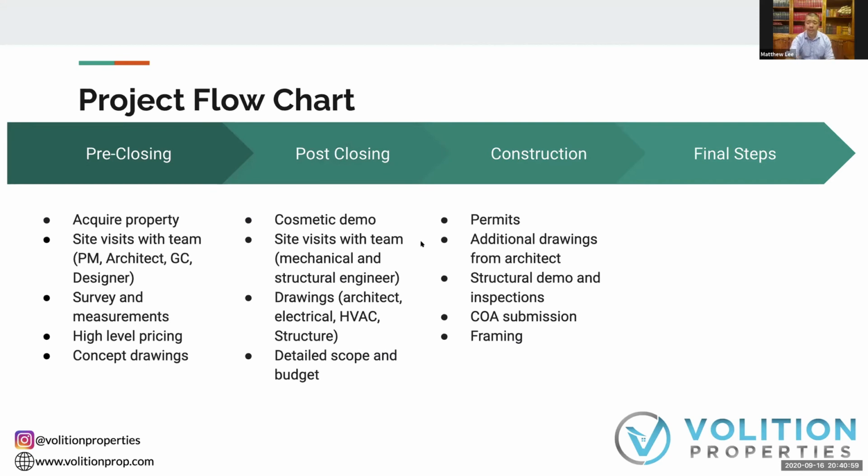That starts off with framing. If you're not familiar with what framing is, it's literally the frame of the house. We do wood frame houses at the size and scale we're talking about. So we start off with structural framing, which is all the structure that's required. And then we move on to cosmetic framing, which is framing out the bathrooms, bedrooms, living spaces, and things like that. If you go, we can jump to the next slide.